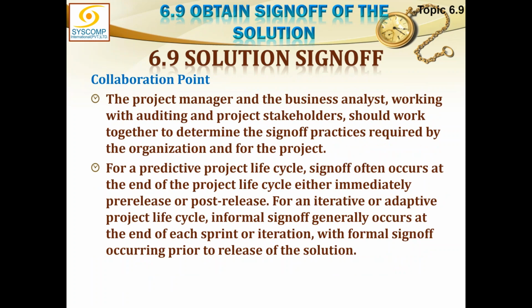Organizations with informal sign-off practices need to obtain sign-off in the manner that is acceptable to the organization. The collaboration point here is that the project manager and the business analyst, working with auditing and project stakeholders, should work together to determine the sign-off practices required by the organization and for the project.